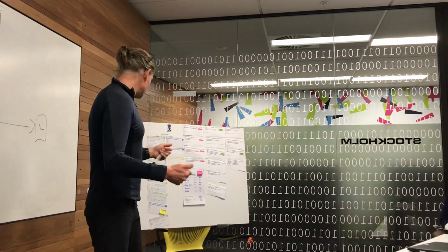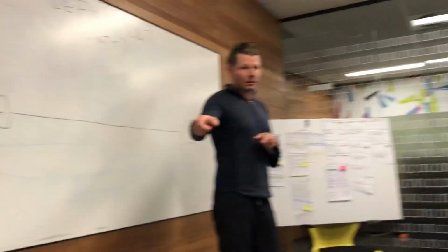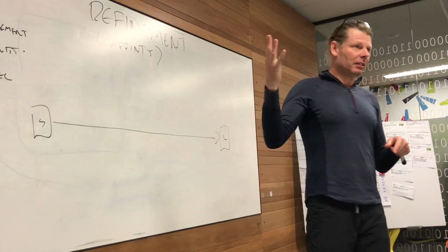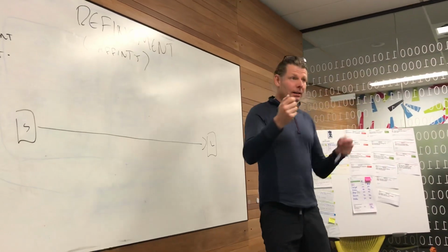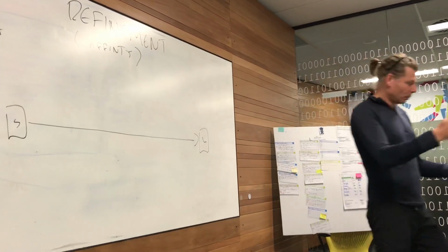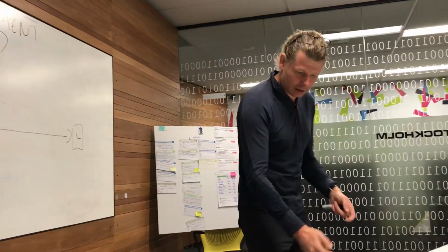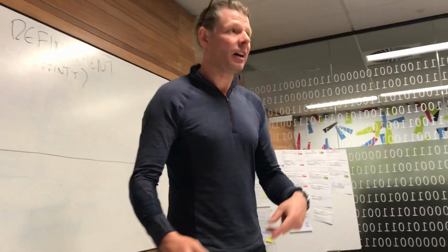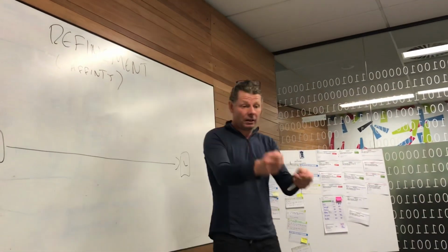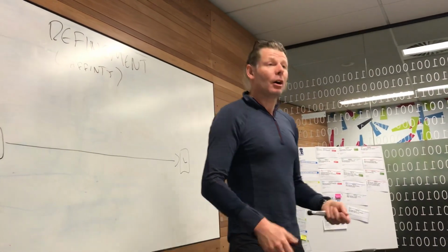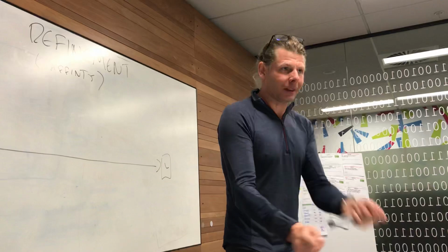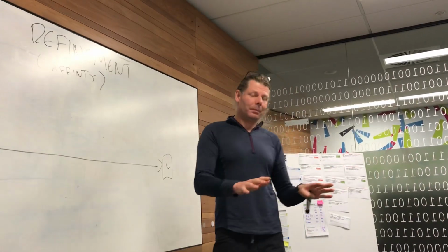Well, because you've already done a few stories, the done stories here, we have 1s, 3s, 5s, 8s, and 13s. We then distribute those, and you'll put them down and you'll go 5, yeah, it's probably here, 3 is here, this is probably the same size as these. And again, you sort, and if you disagree, you can swap each other around.